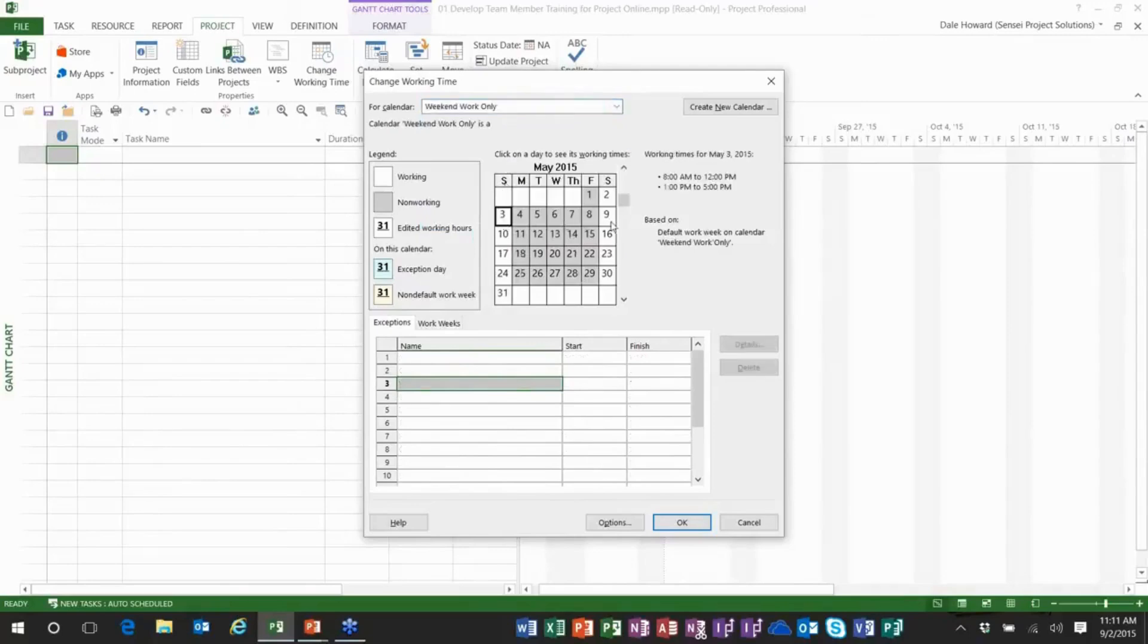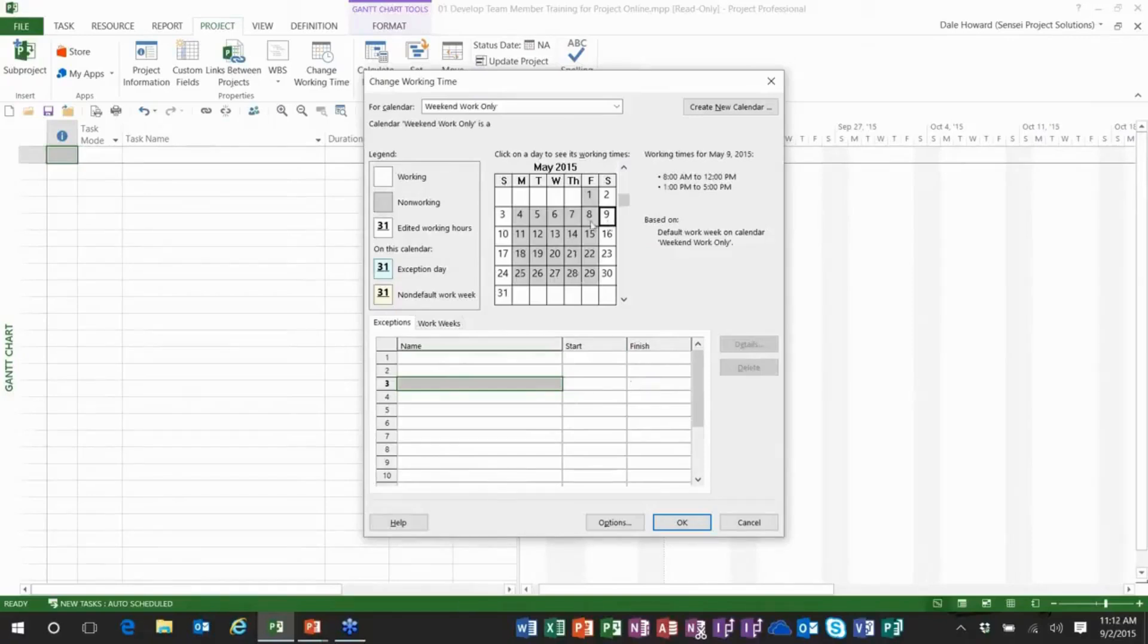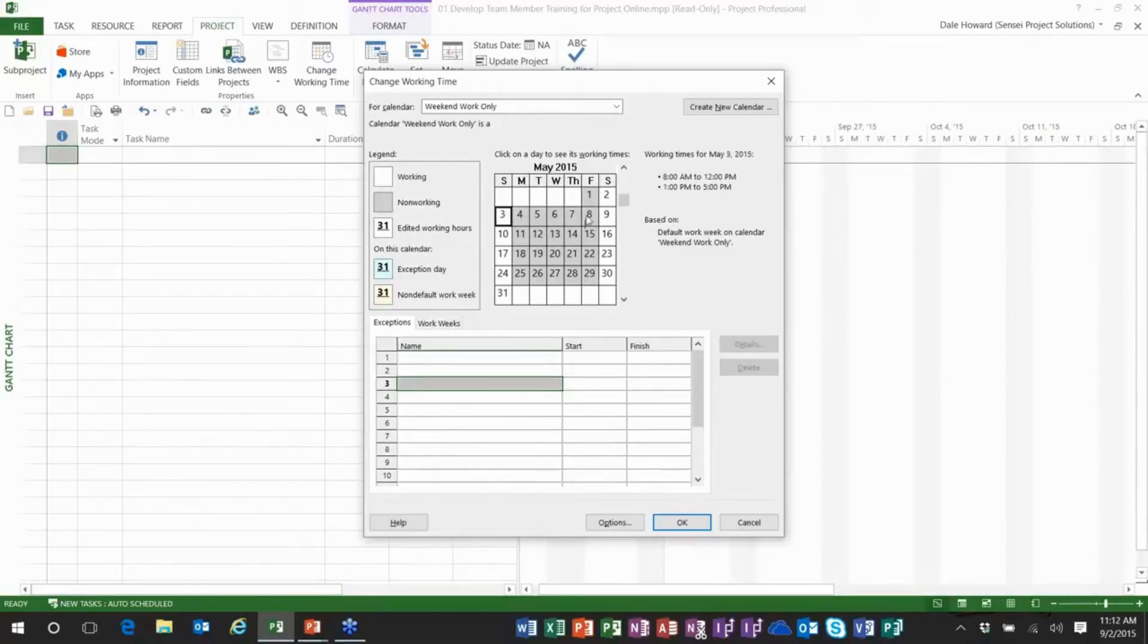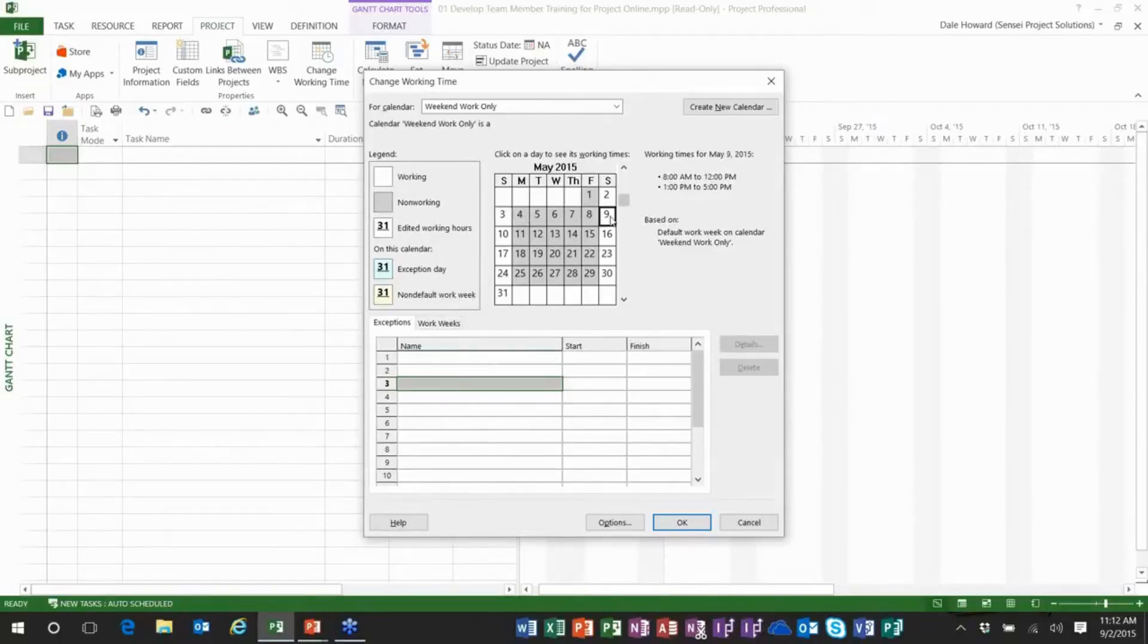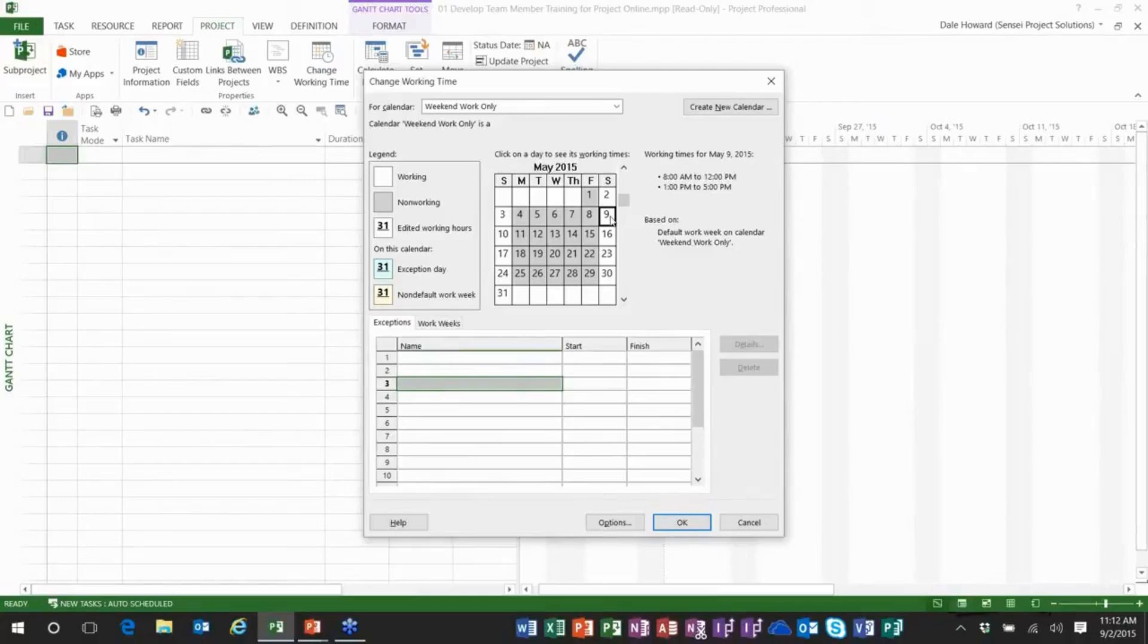And then beyond this I also created a special calendar called weekend work only. And here you can see that anything that would be scheduled using this calendar would have Saturdays and Sundays as working days and the five days in the middle Monday through Friday are non-working time. In IT projects there are some tasks that can only occur on a weekend such as if we have to take down a server for replacement or upgrade. We do that on a weekend so it doesn't disrupt business quite as much.